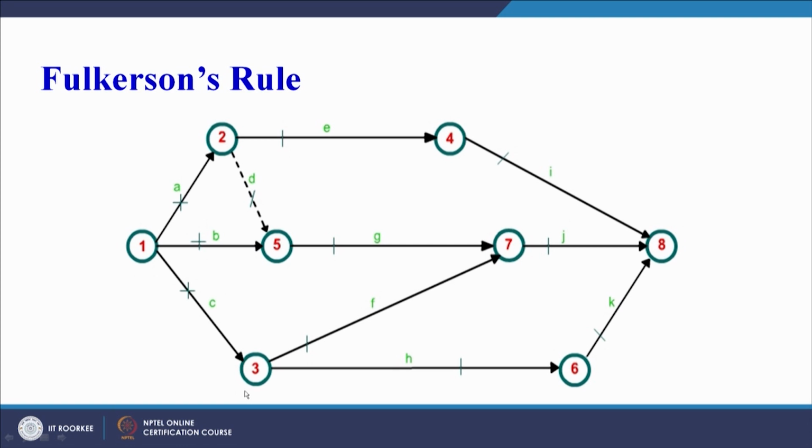Normally it is a practice that the top one gets the lower number and the lower one gets the larger number. So 1, then this is 2 and this is 3, and we are not numbering this as 4 right now, because D is coming out from 2 and entering here. So this has 2 entry points, and even after striking off this, there is another activity entering here.